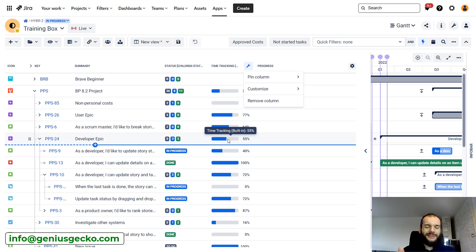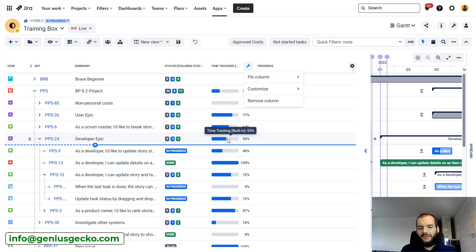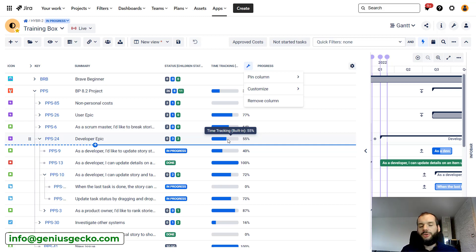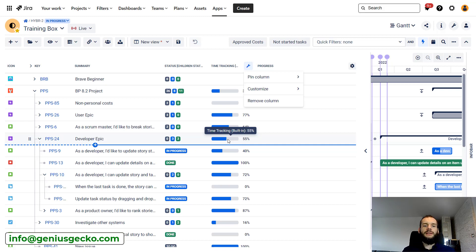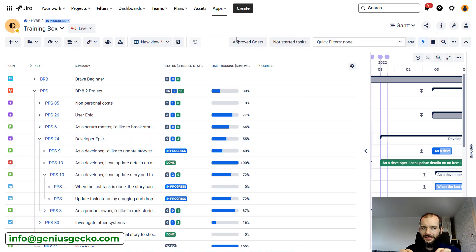The downside of this approach — and very often a blocker — is that it requires estimating and logging time. Very often employees are already logging time in another tool used for accounting, for example, and management does not want to ask them to log the same information in a second tool like Jira. If that's the case, time tracking cannot be used. But if you're already using time tracking or considering logging all work on Jira issues, I find this approach the best one.